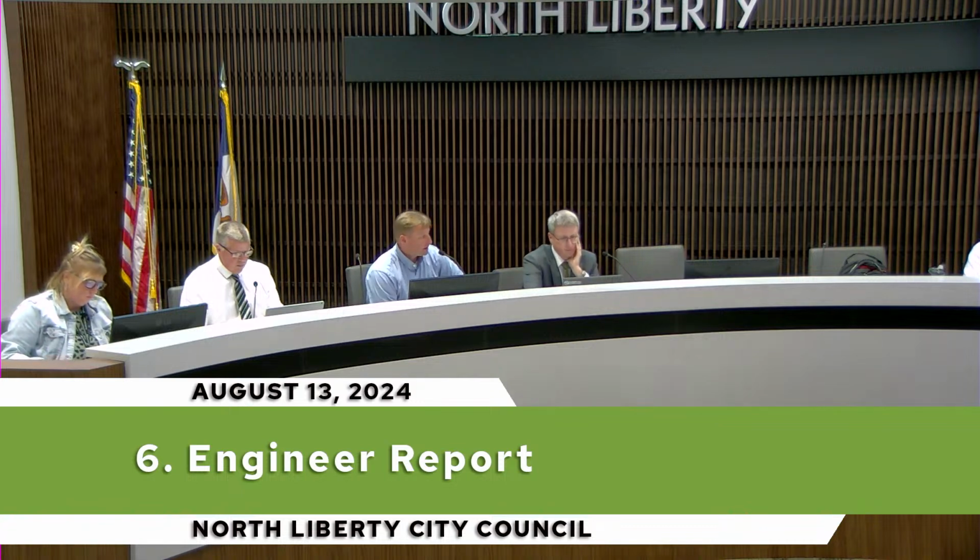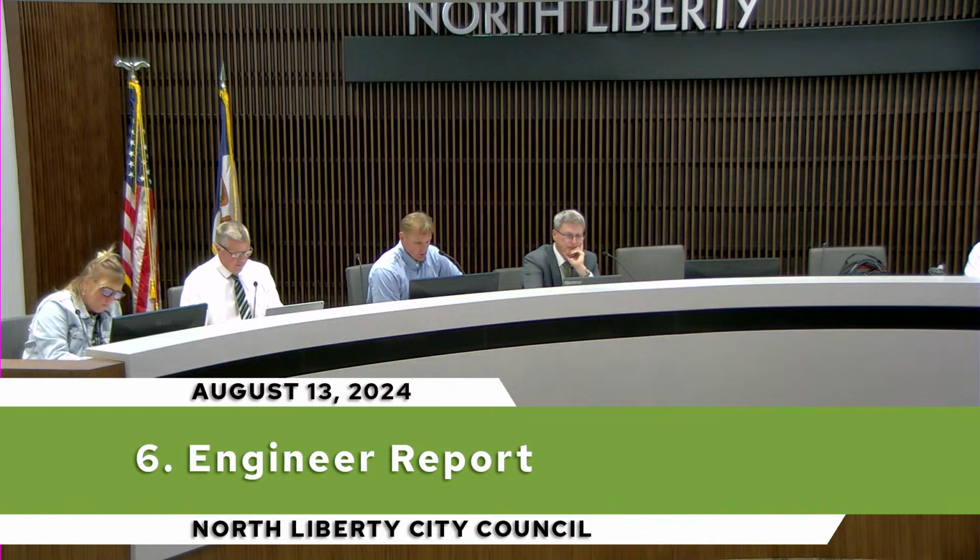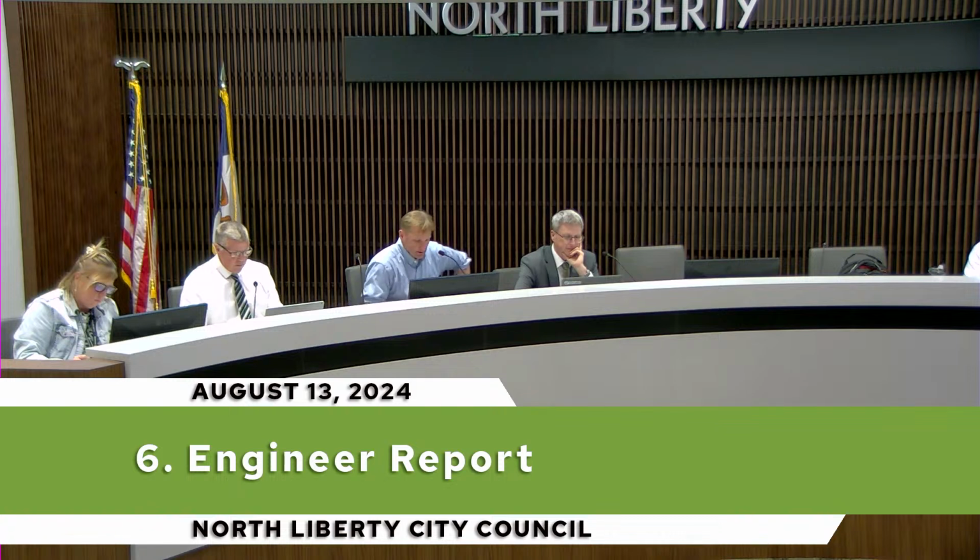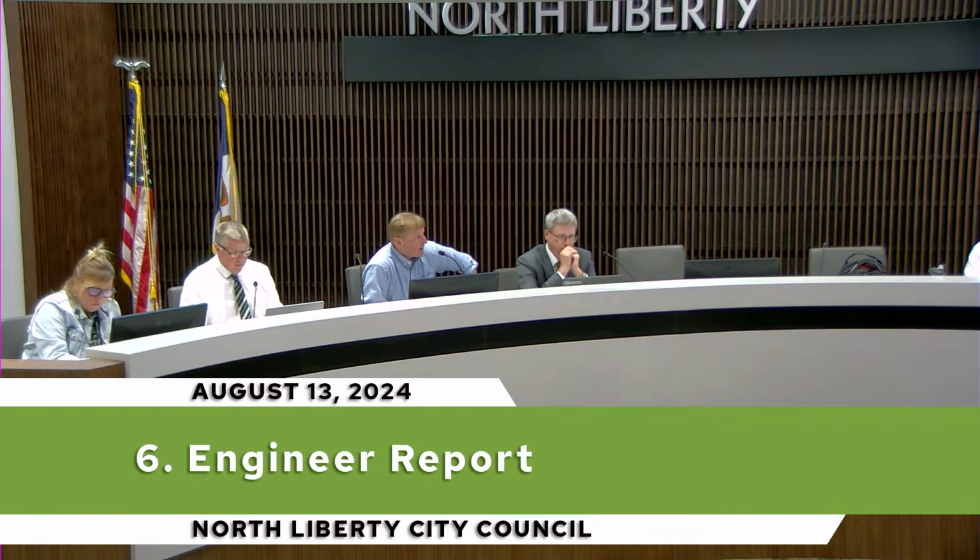Community Center parking lot improvements, Phase 1. That project was recently approved by the council. Just a quick note that the survey and base mapping is completed. The design work is getting started for review set in September, and that's planned for bidding this December and construction next year. Same thing with Freedom Park Trail. That was also recently approved. Similarly, the survey mapping is done and the design has started for that one. That's also bidding this winter for construction next year.